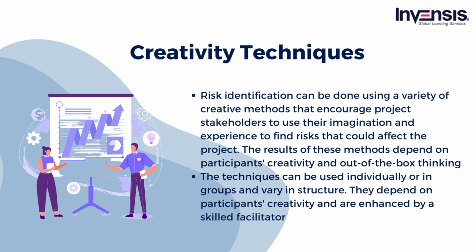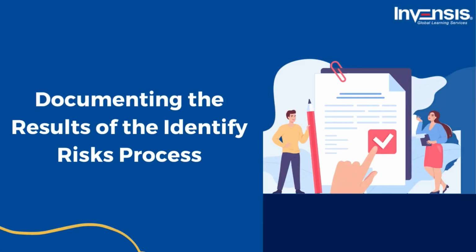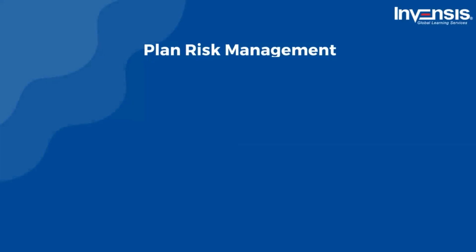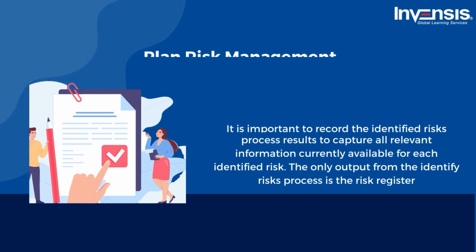Again, they mainly depend on the ability of participants to think creatively, and their success is enhanced by the use of a skilled facilitator. Now we will discuss documenting the results of the Identify Risks process. It is important to record the identified risk process results to capture all relevant information currently available for each identified risk. The only output from the Identify Risks process is the risk register.